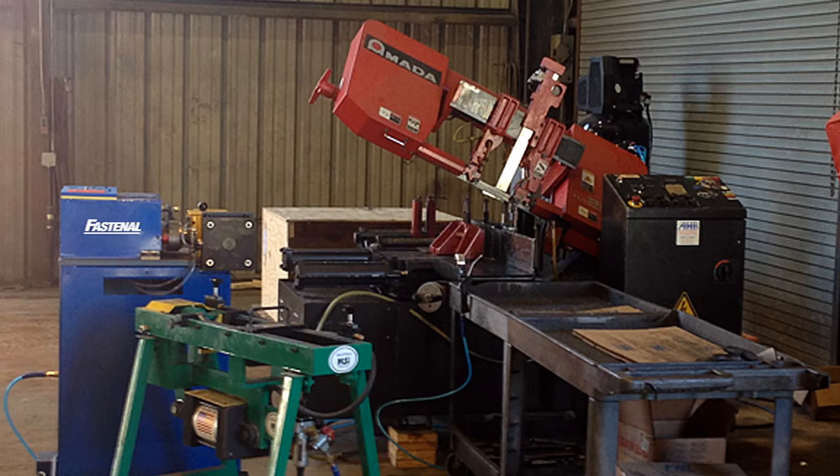I've heard you say this before, but what is the saw proposition? Yeah, the saw is a neat value proposition, a unique model, right? And an investment by us. It really takes care of the unforeseen need in a turnaround situation. Going into a major TA, there's a lot of planning, there's a lot of structure to it. But like any project, you get into a unit, you get into the situation, and there's an unforeseen change order or whatever it might be. And the saw lets us have a same-day resource for that unforeseen need in a B7 or B16 situation, which really is a huge savings or mitigation of supply chain risk, because it's right there, and we can deliver the stud potentially in an hour versus an expedite that'll take a day or so.